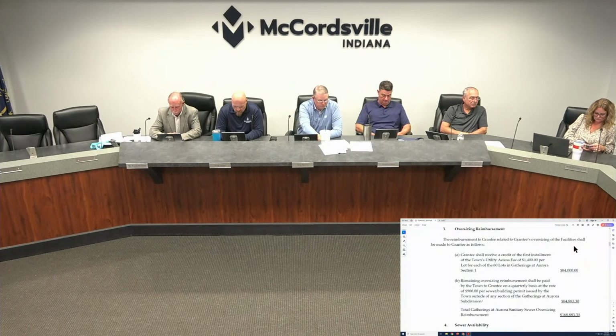So we're reimbursing right now for an interceptor that was constructed through Colonnade. This is an extension of that same interceptor. So we have a 15-inch sanitary sewer as opposed to what the developer would have to build if it was just servicing his, which would be an 8-inch. So we're paying for the upsize and the increased depth. So that's what the amount is for.